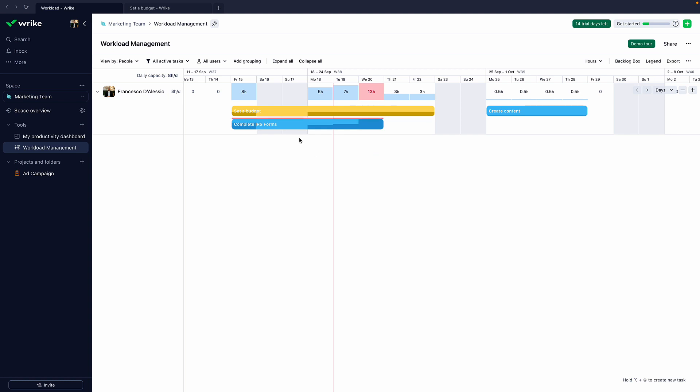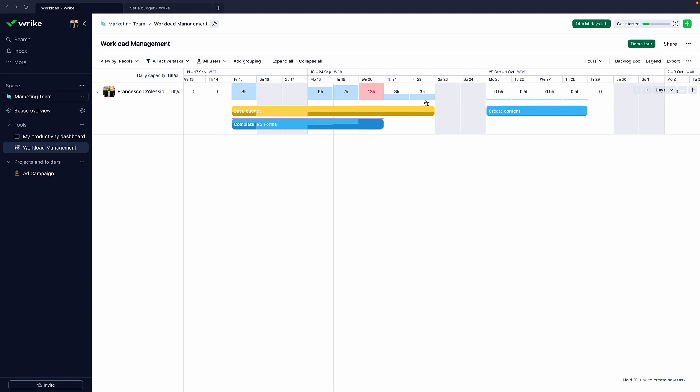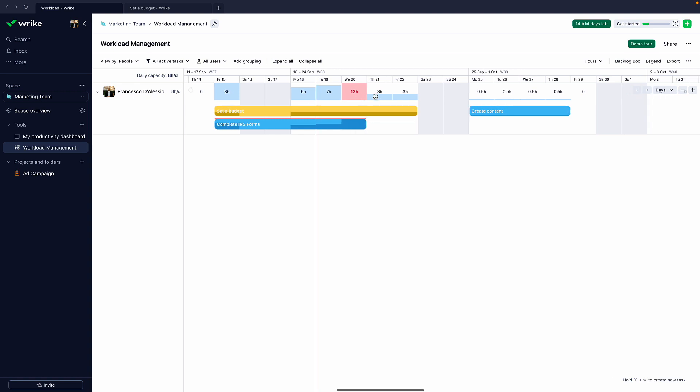So this is really neat. I've got two tasks on my list. And as you can see, they've all got different day workloads. This has filled my day up, this has almost filled my day up, this is almost just filled my day up. And this is an indicator that I'm allocated overload on my task. So if I have an additional person down here, I can actually basically allocate some of the workload to them, which is quite cool. So we can share the workload and make sure that it's not overwhelming.